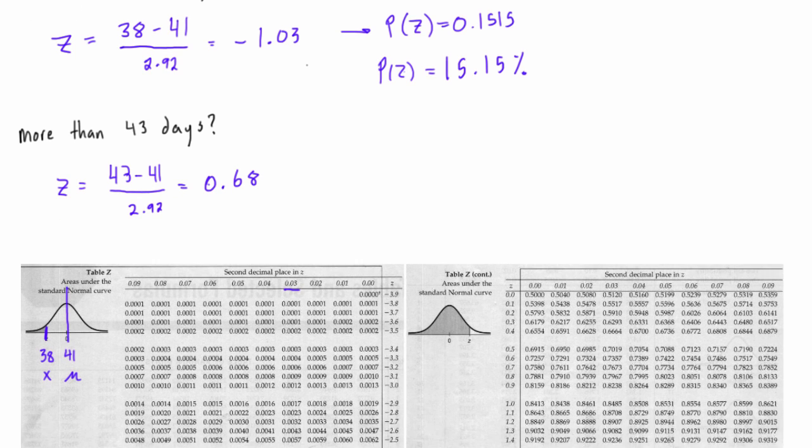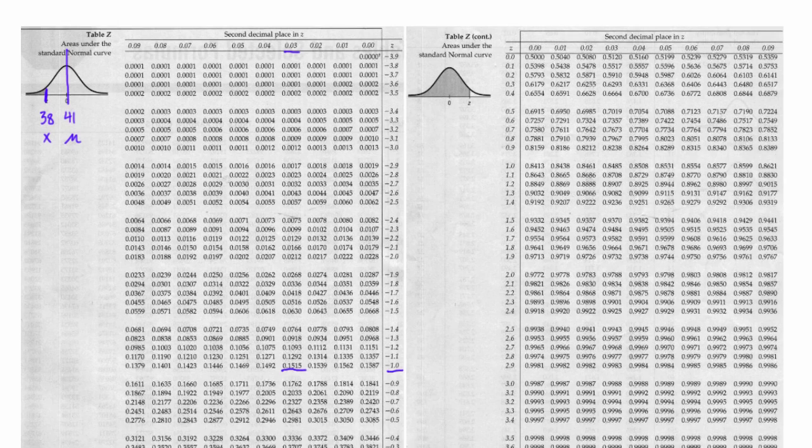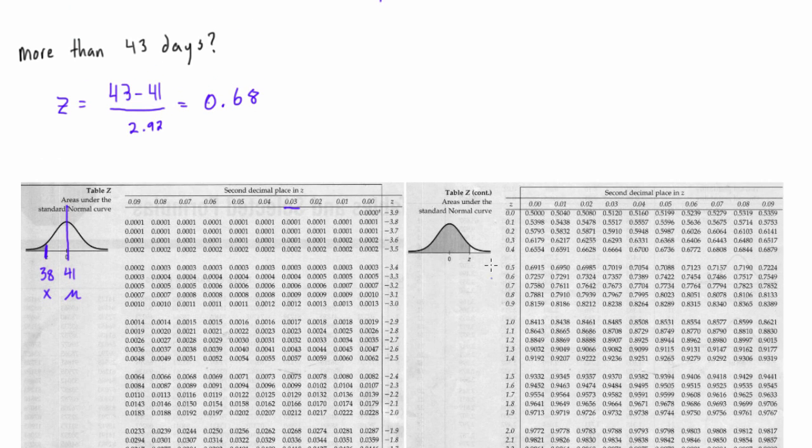We're going to come down into our z-score tables. We have a positive value, so we're not using the negative values, we need to find the positive value, and so 0.68. Let's come down, we'll be up close to the top here. So we have 0.6, and 0.8 will be right here. So that would give us 0.68.